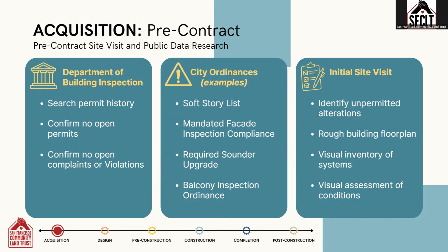The construction manager will also conduct an initial site visit. This is a preliminary visit with the goals of identifying unpermitted alterations, understanding the rough building floor plan, taking a visual inventory of the major building systems, and making a visual assessment of the property conditions.